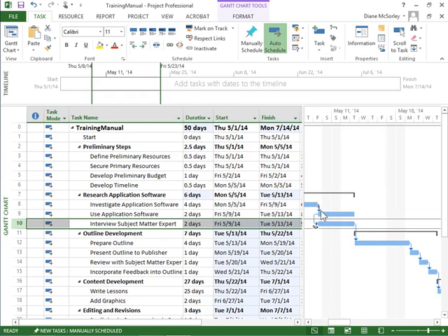So as you build your plan, that's another thing we have to think about. How do the tasks relate to each other? Must one finish, then the next begins? Or can I have 2 tasks start at the same time or finish at the same time? Or, right, 4 different link types for whatever you need.